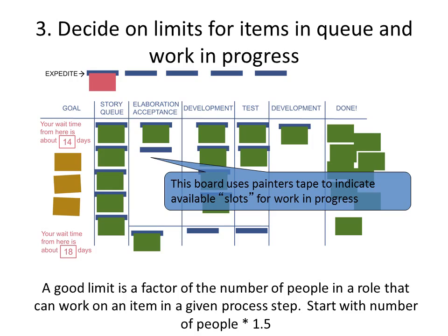So it shows that there's one more task that can be pulled and so forth. And any time there's a pile up on a certain lane, the other team members stop the other part of the process and join in to help move those forward, to figure out what the problem is, what the bottleneck is, and solve it.